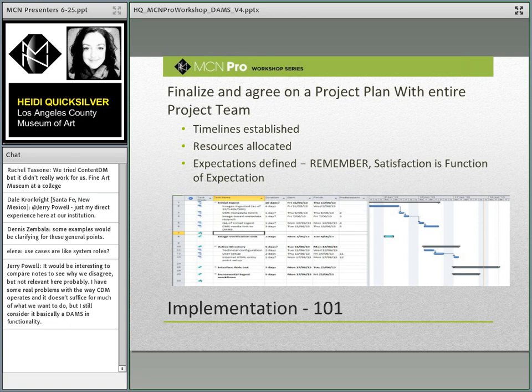And then when you have your beta implementation, then you get people to start using it. That's when you get your pilot user group going. Document gaps and functional expectations by using that pilot group. Make them use the designed functions specific to their department or specific to the whole institution. And document anything that maybe isn't working the way you thought it was going to. And have them say, hey, I really thought the system was going to do this, but it's not